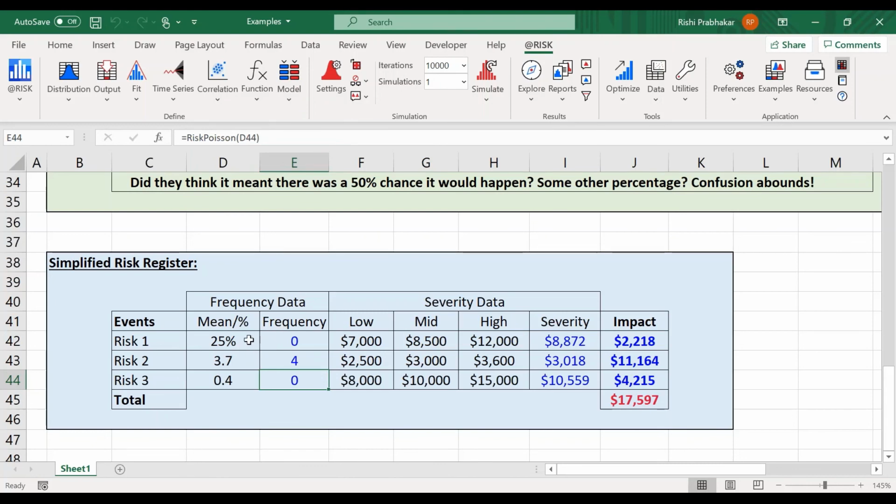For instance, let's make this one simpler. Let's say you're actually going to be 40%, so you can be a Bernoulli, okay? So I've got a Bernoulli there, yes, no, and a Bernoulli here, yes, no. This parameter equals, if this equals 1, then it is 60%, otherwise it's 40%.